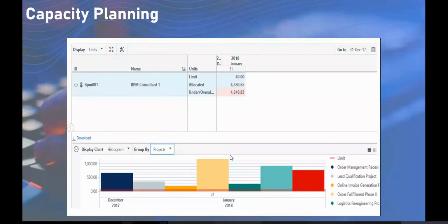Usually industries will do this in the initial stages of the project. In the execution stage, we may know who the resources are going to be that engage in this particular project. But in the initial stages, we don't know who is going to work, we only have limited information. So these are the roles I'm going to deploy in the project: civil engineer, like 10 site engineers, and then 50 laborers, 100 helpers, like that.